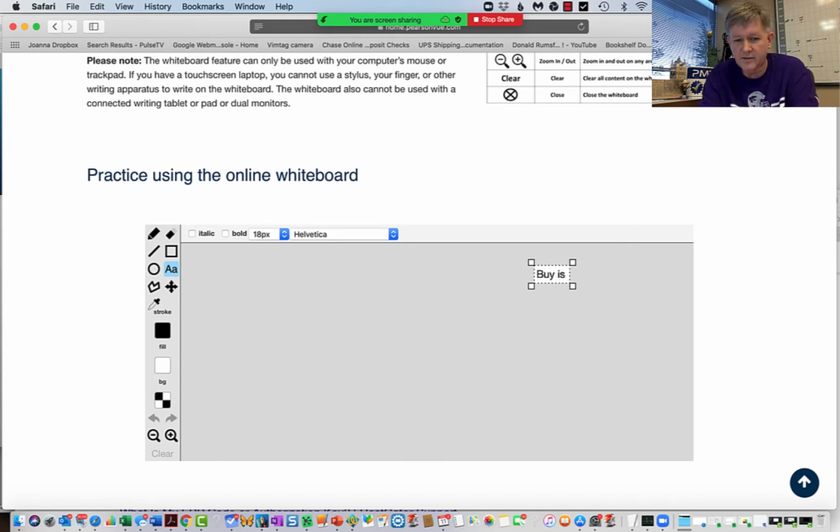Buy is $500 plus $50 a day maintenance. Rent is $150 a day with maintenance, in other words, included. Okay, there we go.